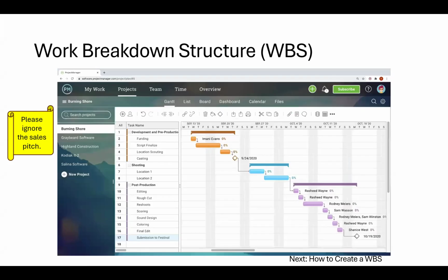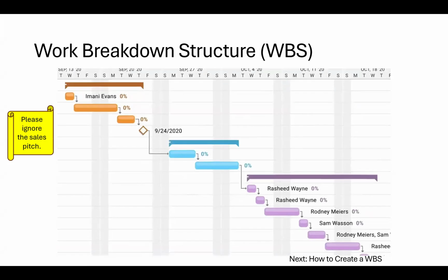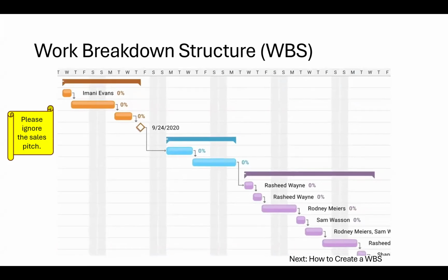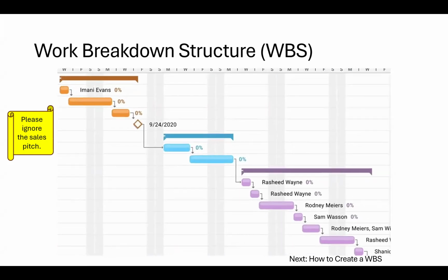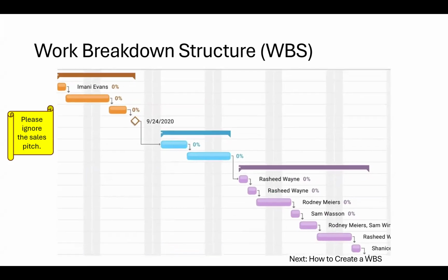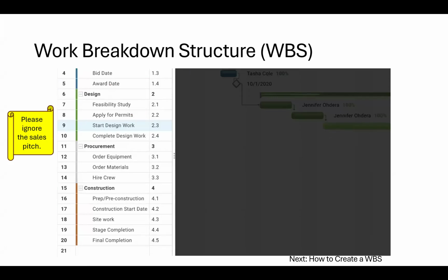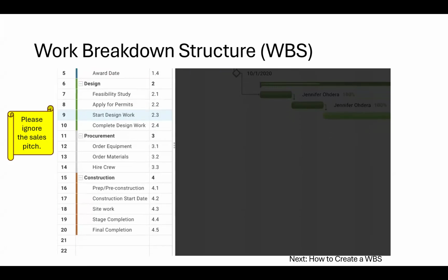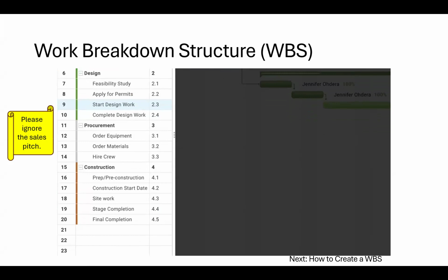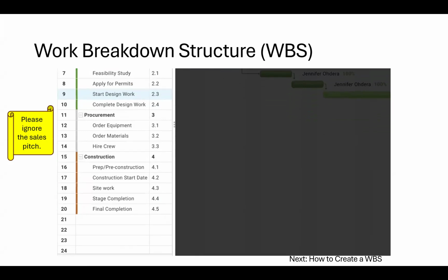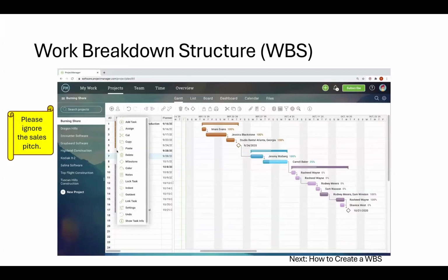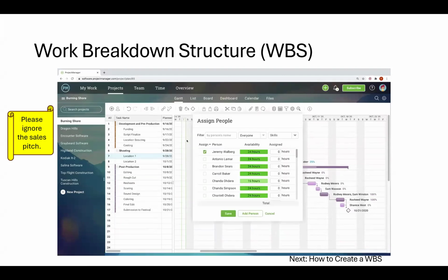Generally, tasks need to unfold in a certain order, particularly when one task can't start until another is finished. Link tasks by their dependencies so you can avoid bottlenecks and create a critical path to your deliverable, the end product or service you're working towards. With the right planning, you can move ahead with a concrete path forward. Tasks don't get anywhere unless you assign people to own and execute them. Assigning a team member to your task allows you to track their progress as they move forward.